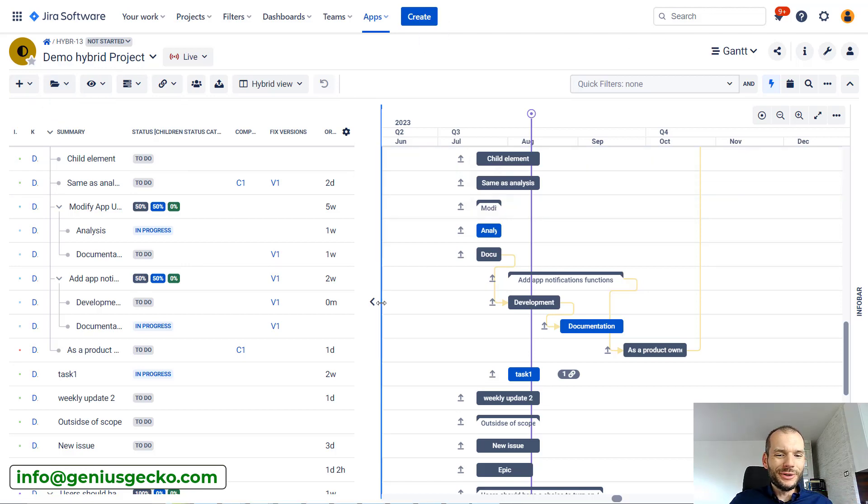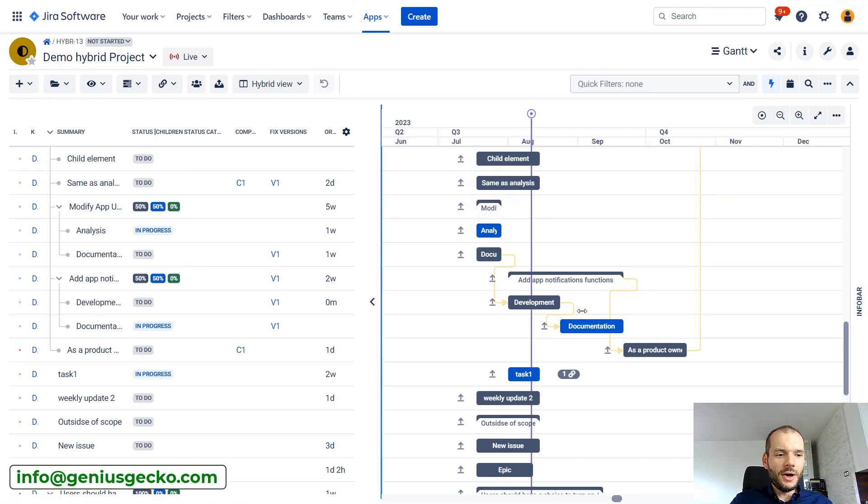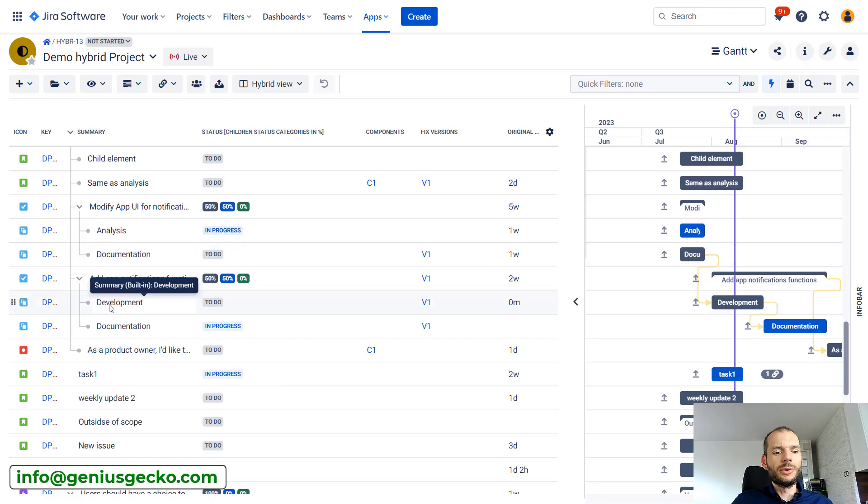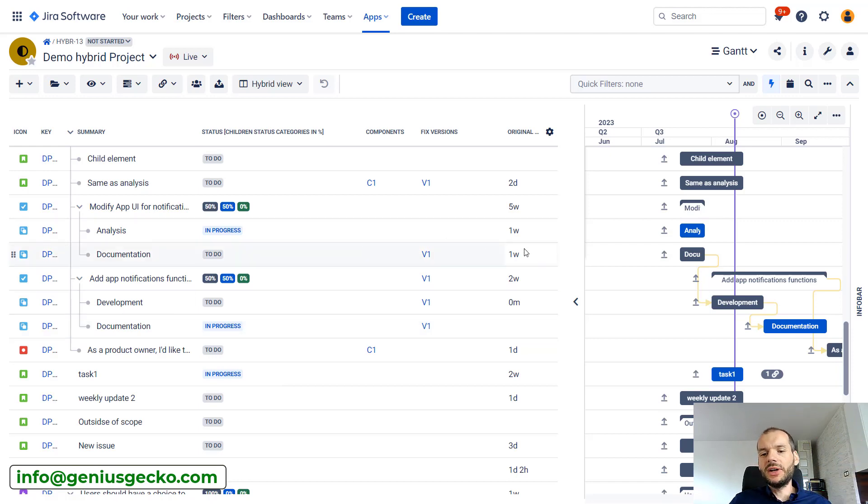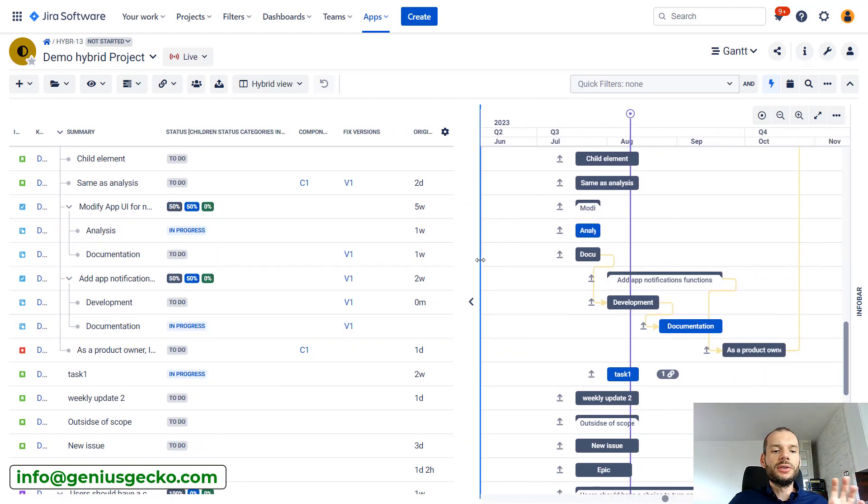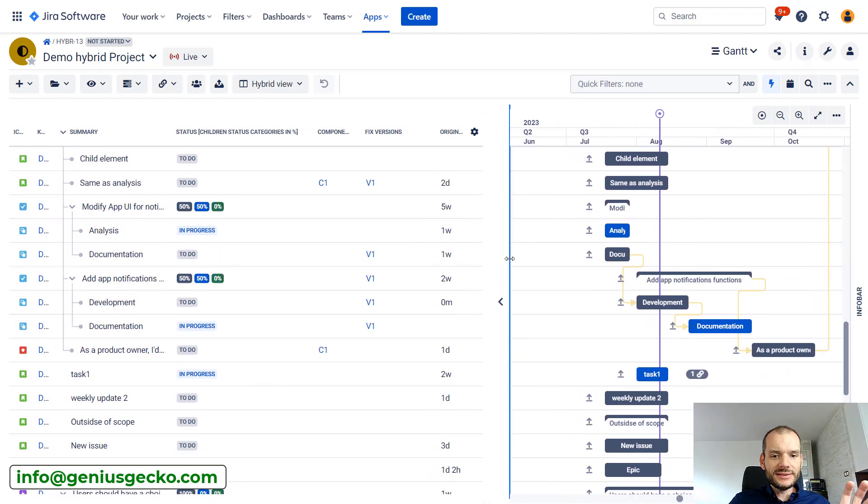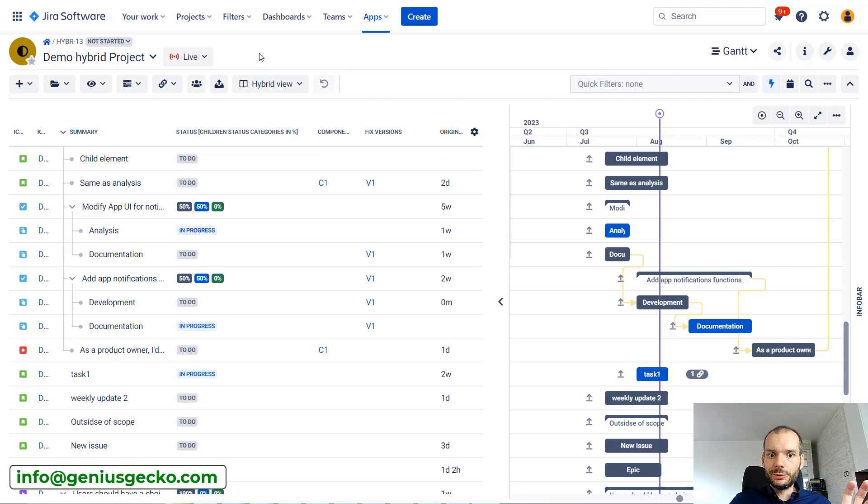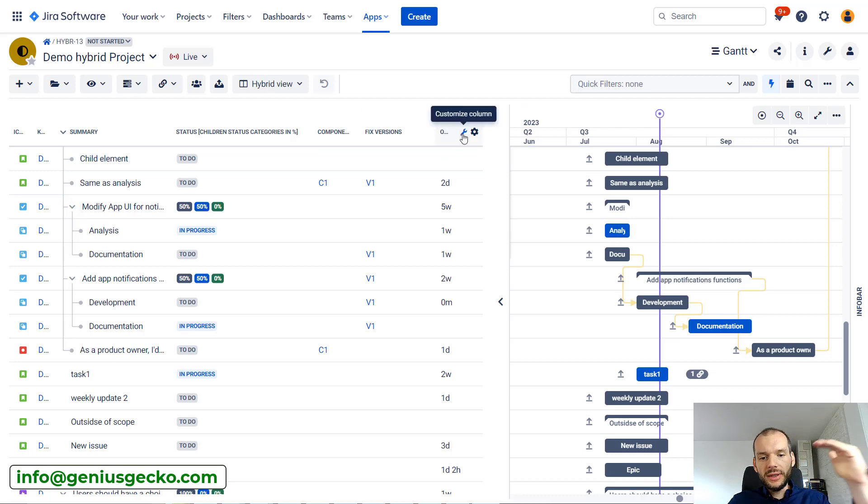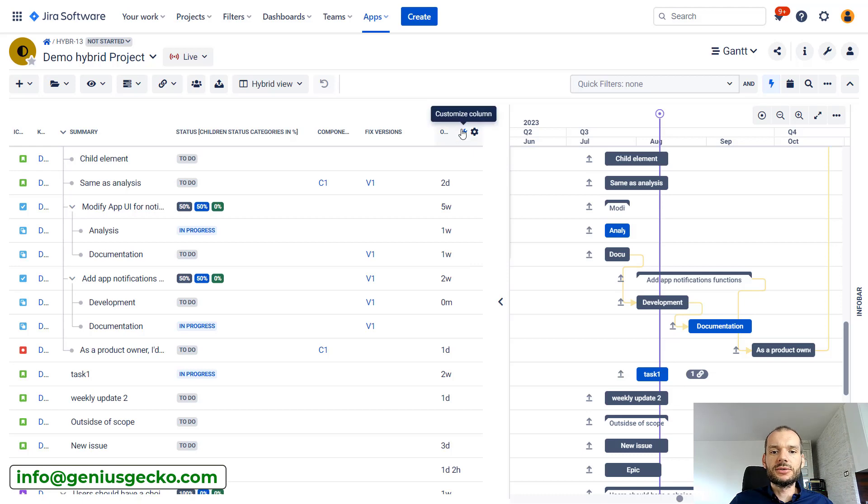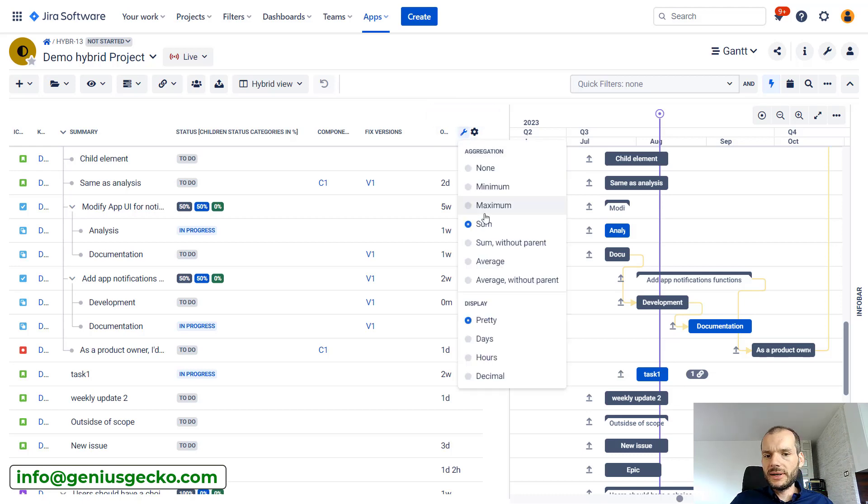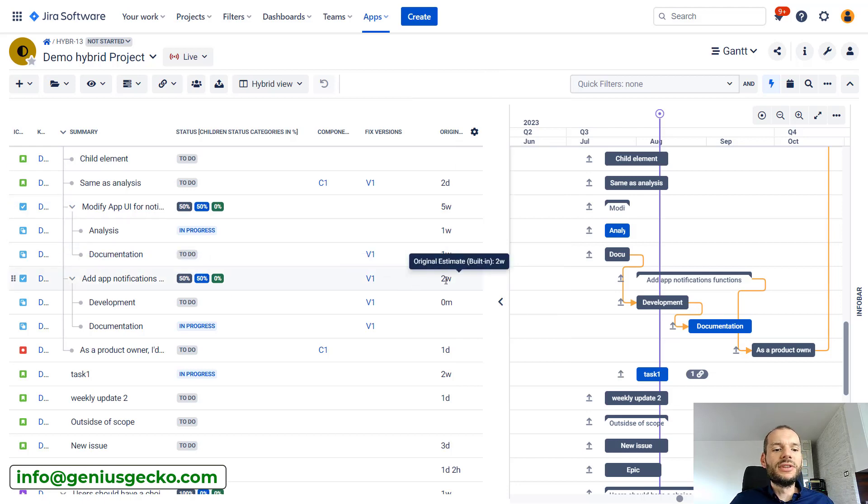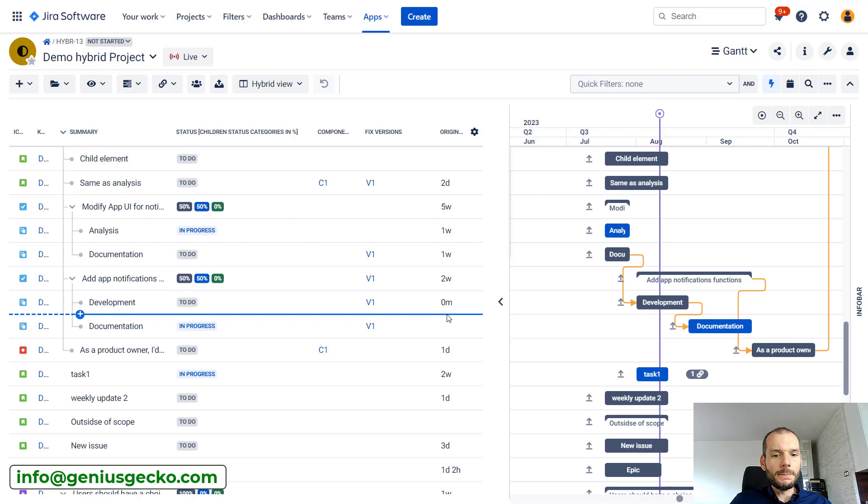Before we do the grouping, notice that we have some kind of hierarchy here. We have tasks with subtasks, we could have epics on the higher level, so hierarchy exists. For one of our fields, original estimate, we are doing the aggregation. If we go to customize column you see that I am summing the values. This means that on the parent level I have sum of the values of the children and the parent.